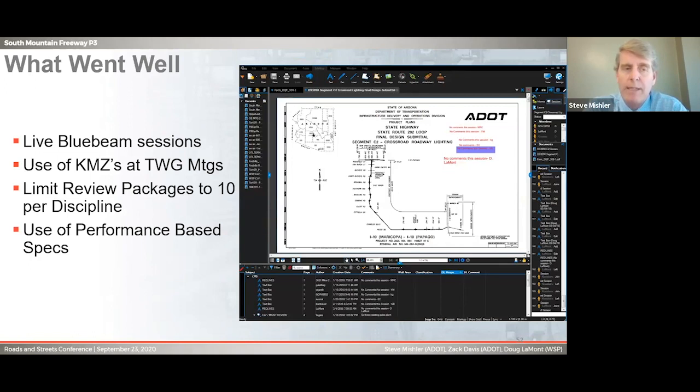Limit the review packages to 10 per discipline. That just helped keep the GEC team lean, and obviously if we're having 300 submittals a month, that was quite a bit to keep up with.